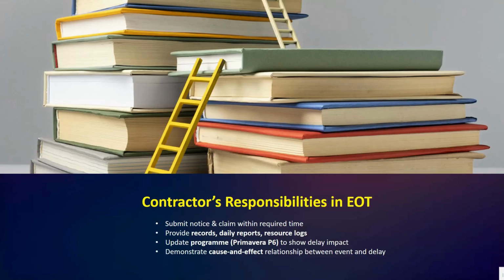So next we have the contractors' responsibilities in EOT. For a successful EOT claim, the contractor has to meet some responsibilities. First, you can see, submit the notice and claim within the required time limit.